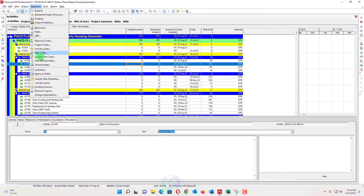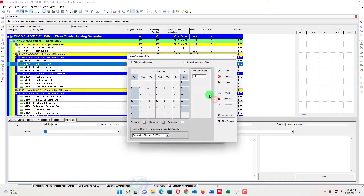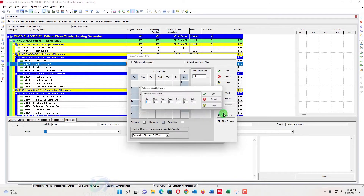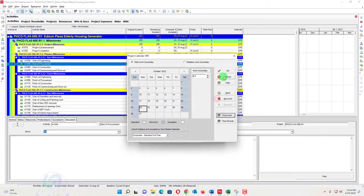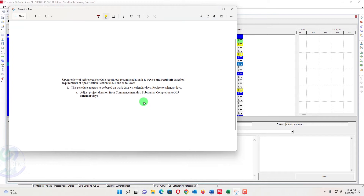We will go to Enterprise and Calendar to see our project calendar. We will go to Modify and see eight hours a day. In the work week we will see there are two days off, and there are also public holidays listed.